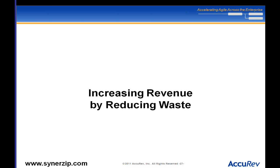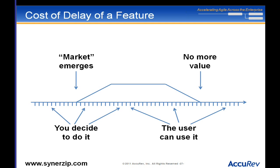One of the ways to increase revenue is by reducing waste. There's a simple tool to think about the value of a feature called the cost of delay. You might think the market value of any particular feature stays constant, but it really doesn't. There's a time at which the market emerges for something, and there's also a time when it's no longer a differentiator — you're not going to get new customers by having it. The relative value starts to drop off, and that may be a long or short period of time.